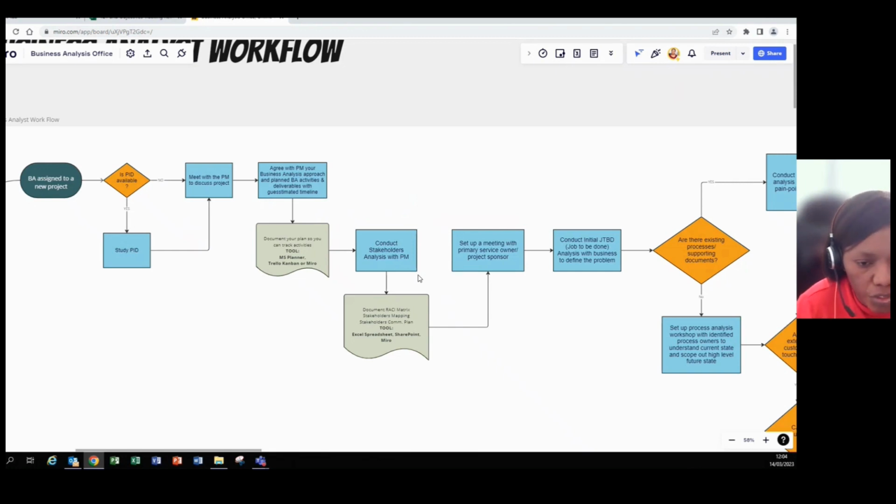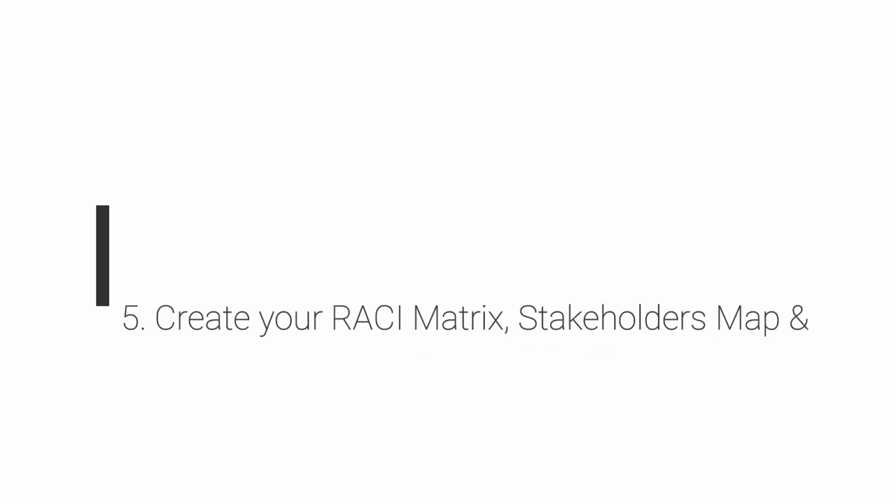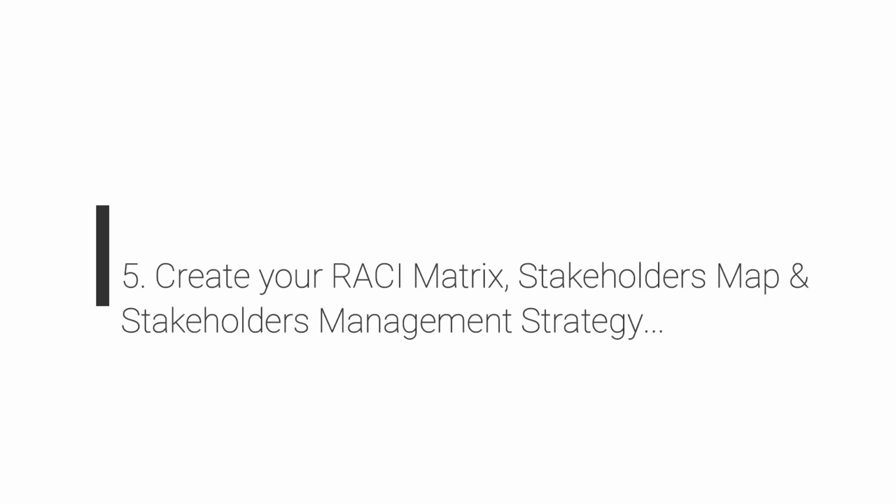So make sure after doing your impact assessment, if you can at this stage, to understand who should be brought in and at what stage of the project, depending on what approach you are using. So when you're having your meeting with the stakeholders, with your PM, analyzing your stakeholders, the deliverables, the document that you want to keep is your RACI matrix. This is very, very, very important.